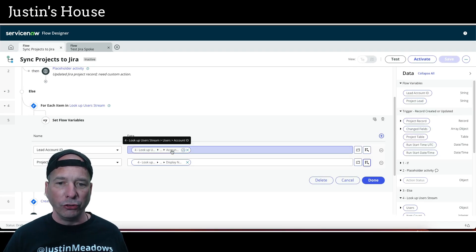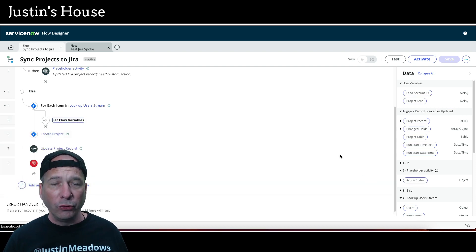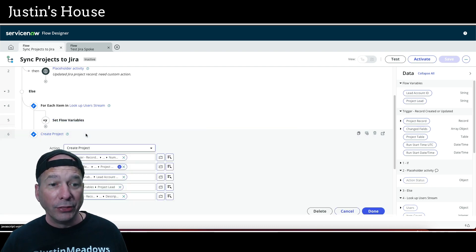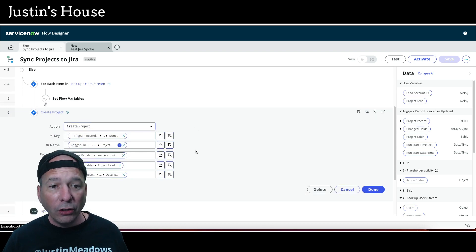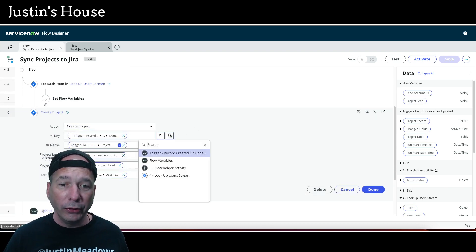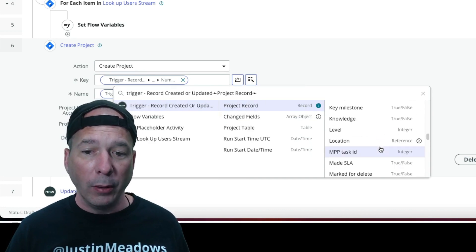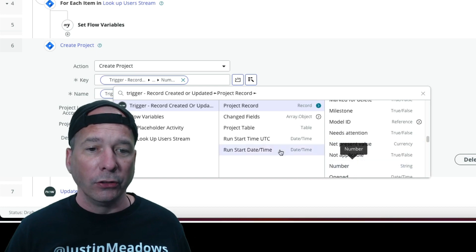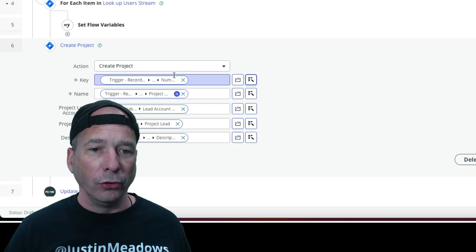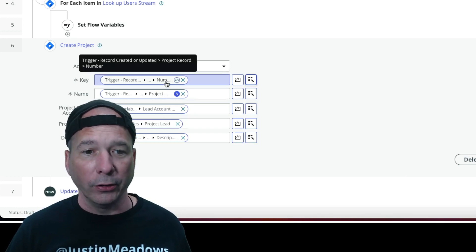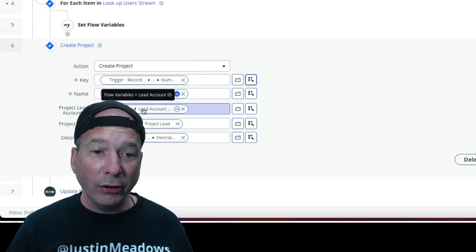If you hover over each one of those you should see account ID and display name. We're going to store those as variables because we need them to create the project, which is the next step. This step is creating the project in JIRA. For the project key, your mileage may vary — you may want to do this differently — but I chose to use the project number. So I scroll down to 'number' on the trigger project record, and that's what I'm going to have as the project key.